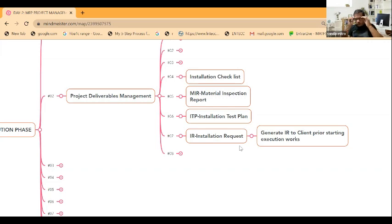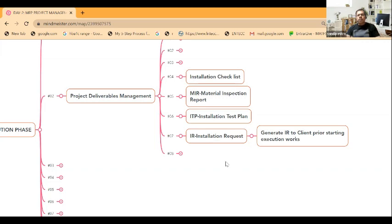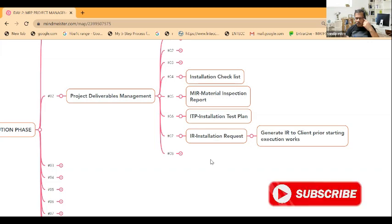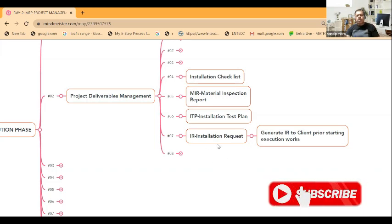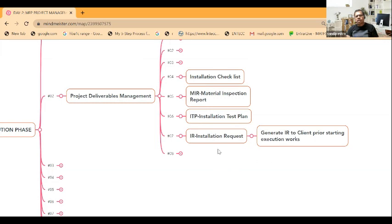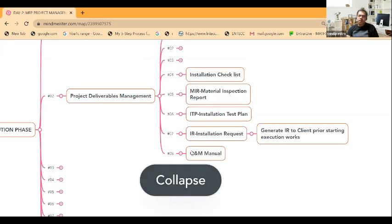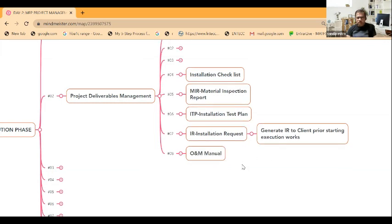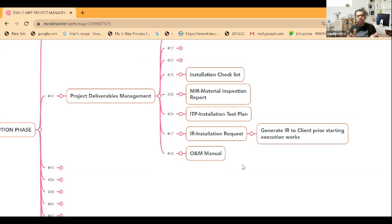This is based on different projects - it's not the same for all projects or all companies. I'm giving this based on some big projects. What is the inspection request? Before starting any job, you have to generate an inspection request to the client prior to starting execution work. That has to be vetted by the client, then only you can start the installation work, because everything has to be recorded. These are the documents to record.